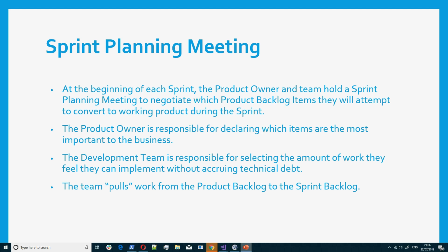And you would also need to consider that there will be times that you might need to do technical debt. Technical debt is those things, in terms of information, in terms of research, where you are not working on a ticket, but you are working on something that would allow you to facilitate working on some other tickets, basically. So those are technical debt. What you need to do, like a prep, like I need to make sure my environment is safe. I need to make sure some trainings are done. So you need to consider those also.